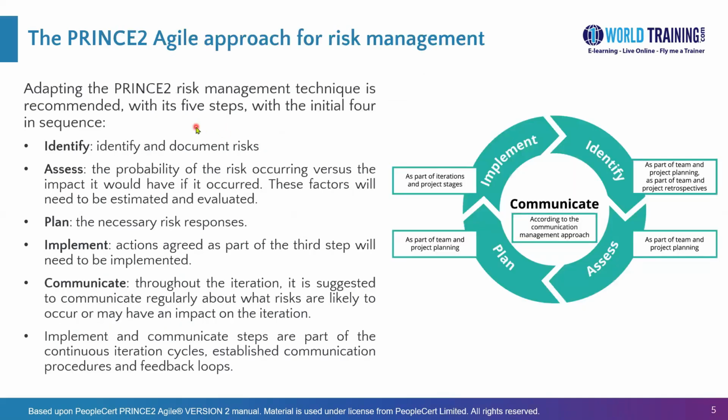We have a PRINCE2 risk management technique, which is recommended. You could have a slightly different technique, but it should not deviate completely from this approach. Essentially, there are 5 steps here. The initial 4 are in sequence: identify, assess, plan, and implement, and then communicate throughout.